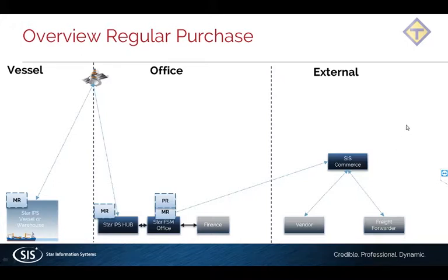See, if there is a small store beside your office in Miami and you'd like to buy there, you can just create that address in FSM, send a request for quotes, and contact this guy, explain the service, and provide the credentials, and he will be able to open the portal and put the price there. Once we receive the quote back, the PR gets the status quoted.